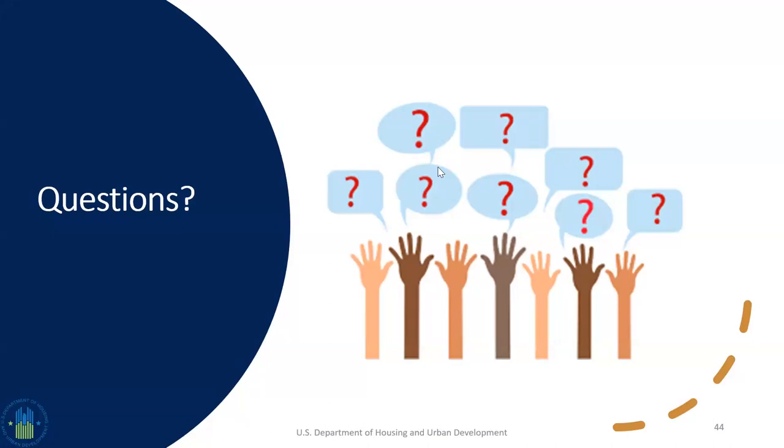But there's just one quick clarification that I would like the panelists to make. One of our attendees has pointed out that in the slides, it was stated that the PHA had to lease to 95% to get the DOFA, but it seems now in the answers that we have provided that PHAs do not need to get 95% lease up to convert. Could you clarify that? Yeah, it's not 95% lease up. It's that 95% of the units have received certificates of occupancy from the local building official. So not that they have executed leases, but that they're ready for occupancy. That's when you achieve the actual DOFA date.